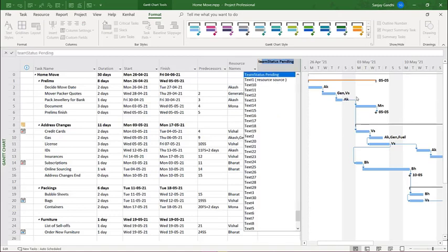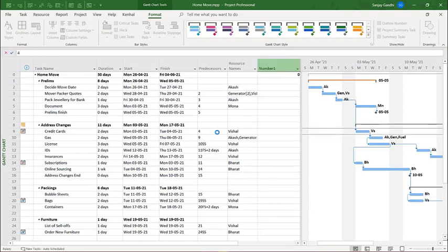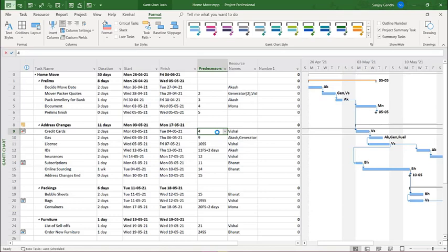the option for text fields available, which go up to 30 over here. And then if we try number, for example, we can see number fields also available, which go up to 20 over here. So there are 30 text fields and 20 number fields available. We can pick up, for example, the number field or the text field from the task and the resource sections. The task fields will not go into resource section and the resource field will not go into the task section. We have to make separately for these two sections.